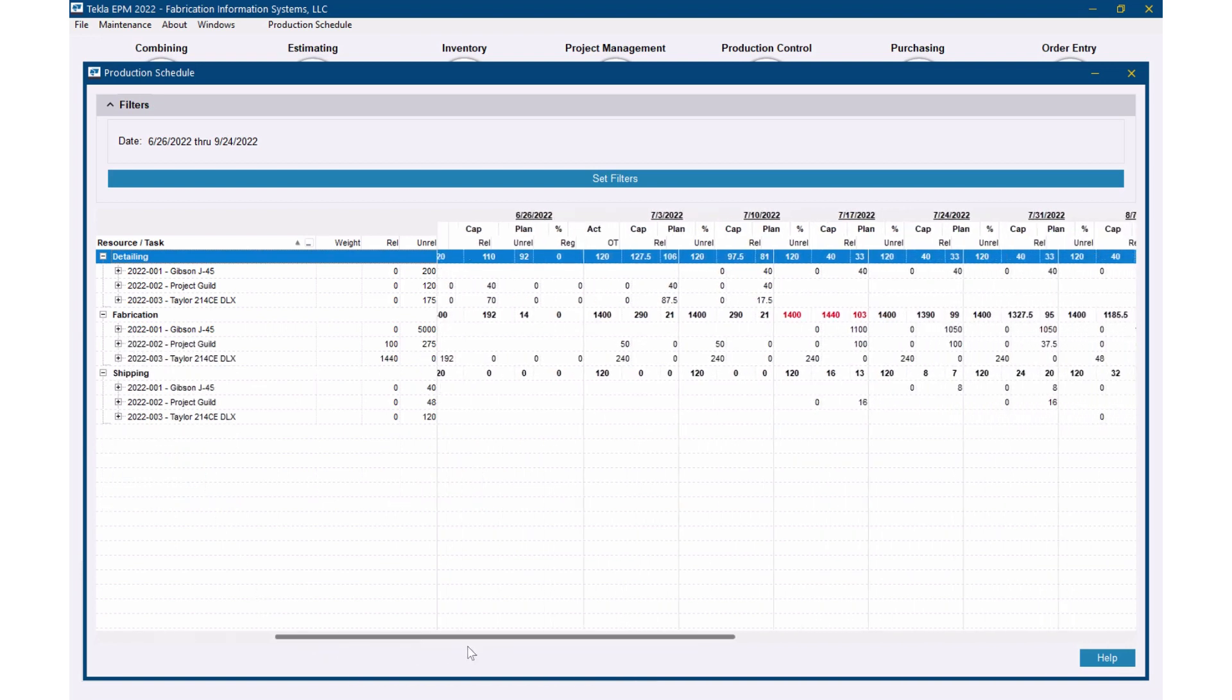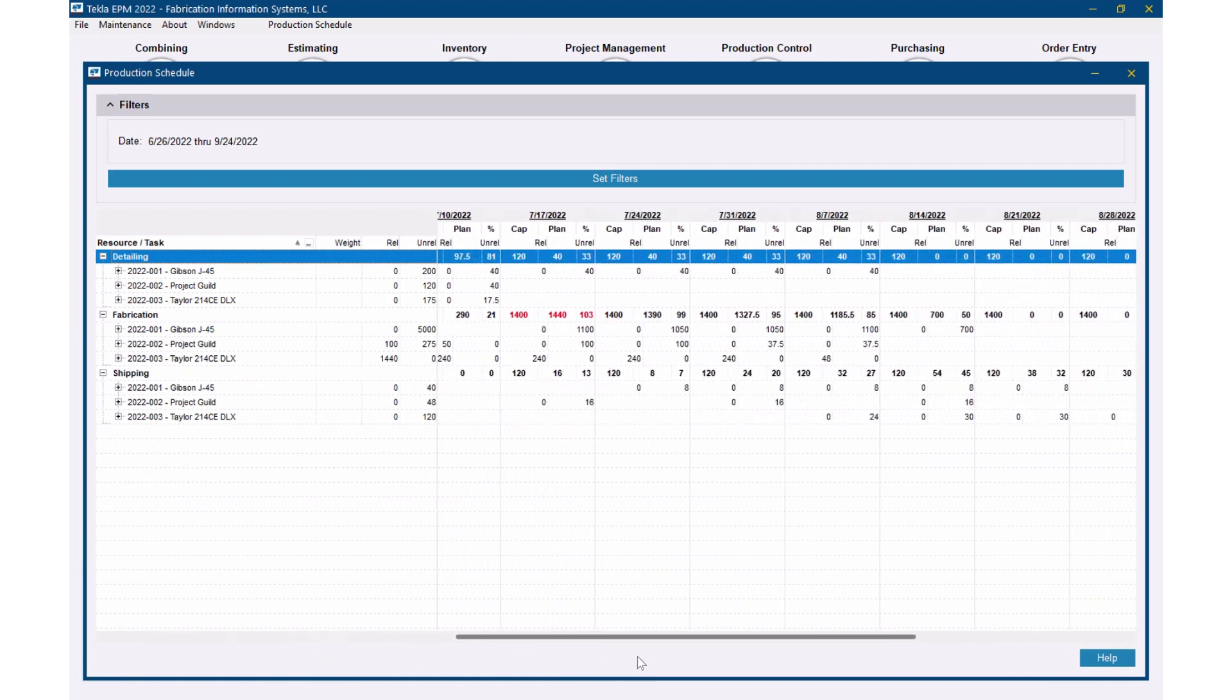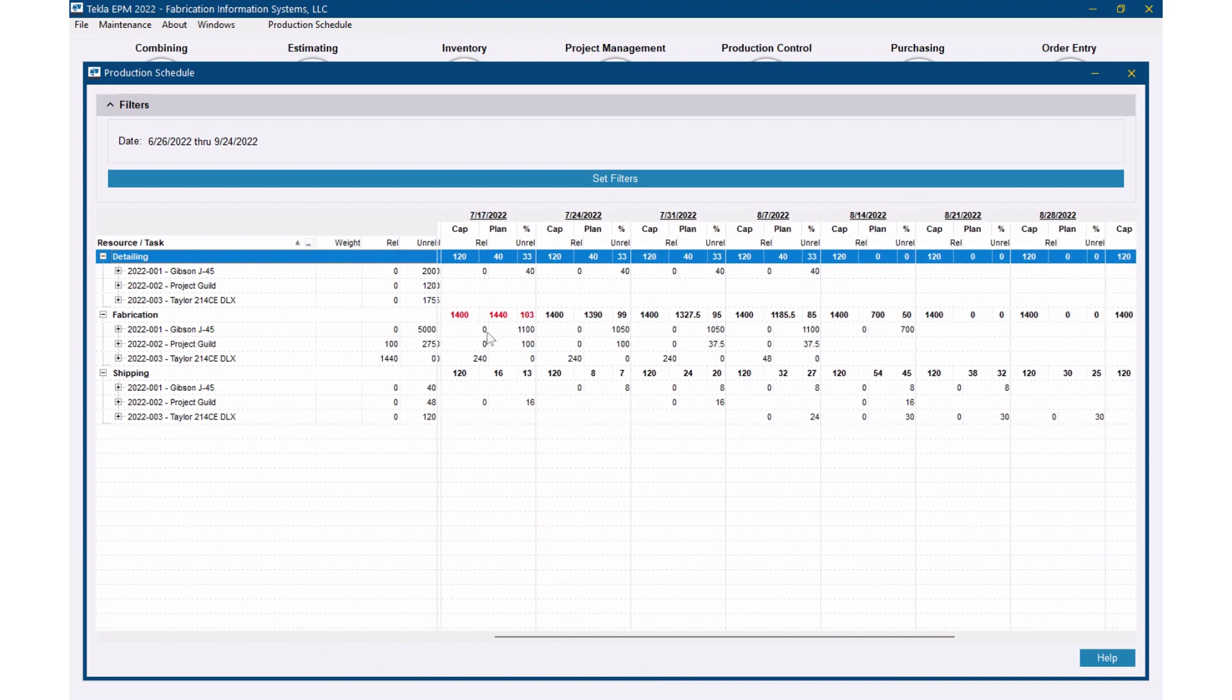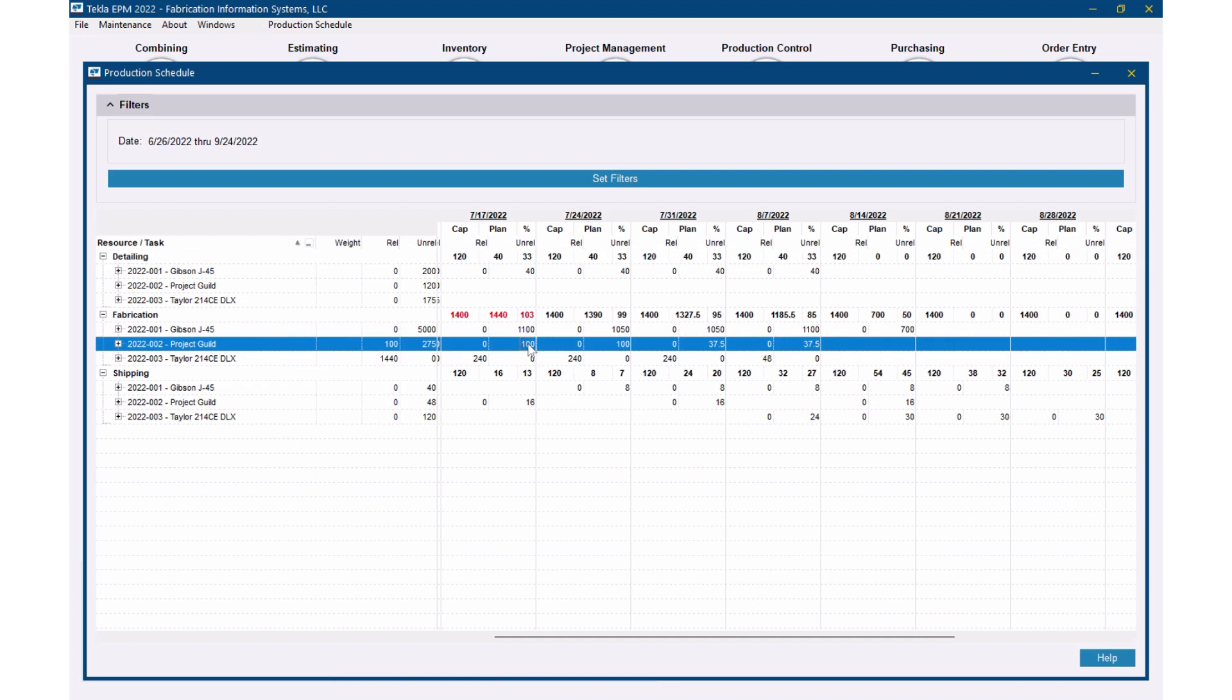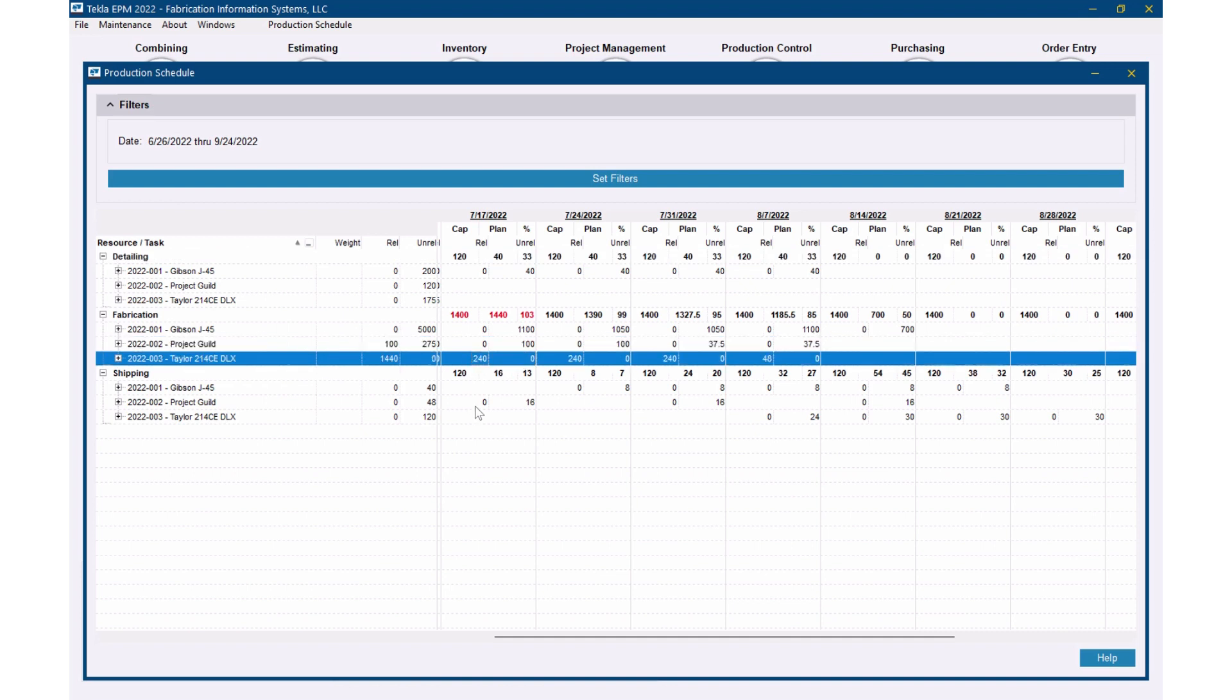Let me go out here though and let's look at my one week where we're over capacity here. So we're 1,400 hours capacity, 1,440 hours planned, 103% capacity. So we saw 1,100 of that was coming from this 001 job and we've got 100 hours coming from that 002 job and we've got 240 hours from this 003. Now you'll notice these hours here are not over here in this column. The reason is because these 240 hours, this entire job is released right now. So I'll follow this up, you'll see this is under this released column.